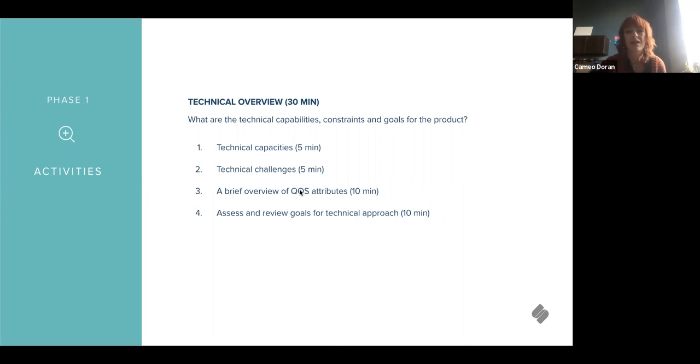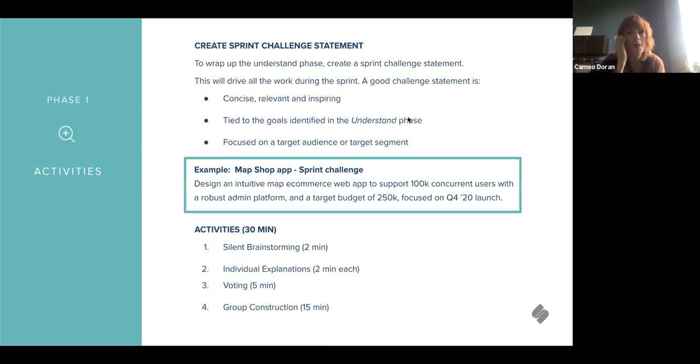It's also interesting during this phase how often the clients lie to themselves about what they think is important. Extensibility is a great example, because in the last 3 solution maps, the client said, absolutely, we have to have extensibility. But there's a lot of cost with extensibility. And when you start giving up features versus the ability to easily extend your application, you might find it's not as big of a priority as you think it is.